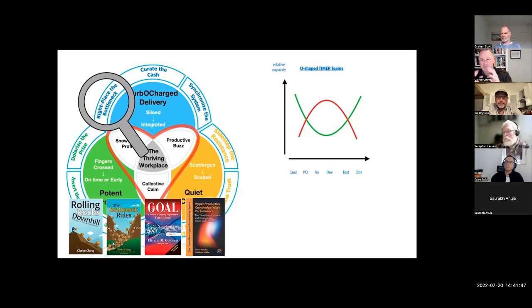So just for example, imagine you're working down a project and you go, oh look, if we keep going, we're still going to make $1 million a month. Keep going, really good, keep doing this stuff. But if there's one just waiting there, and you're going to make $2 million a month, then you're going to go, oh, hang on, maybe we should stop this, even though it's still going to give us a good return, and we should switch to these other projects.